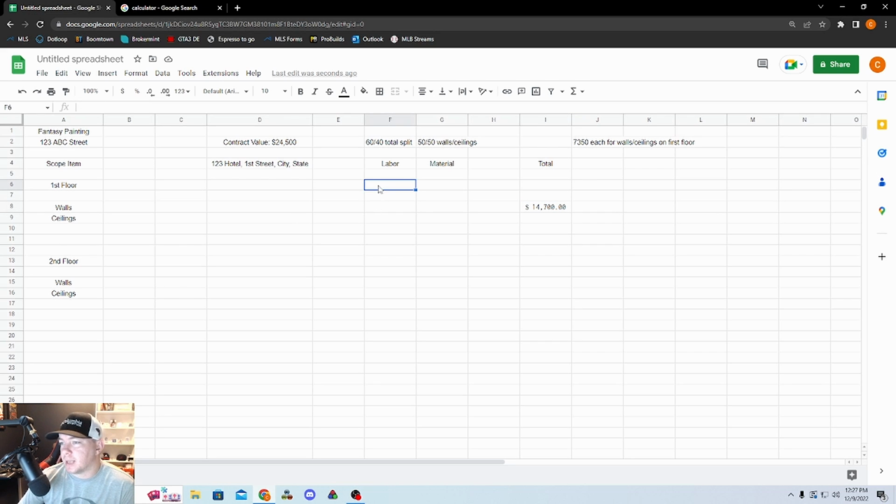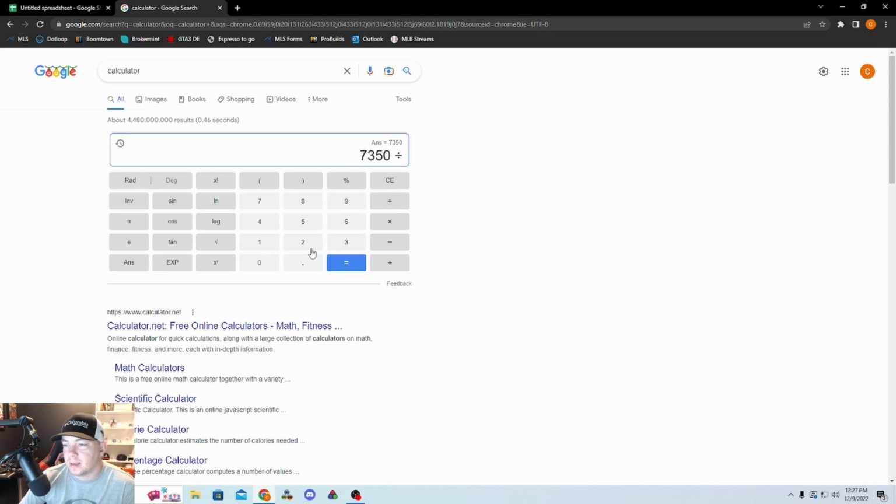It makes sense to me because I've done it many times before, but if it doesn't make sense to you, just ask a question in the comments below, and I'll get back to you. So 14,700, 73.50 each. If you multiply 73.50 times 2, that'll give you 147, so that checks out. So 73.50, we're doing it 50-50 walls and ceilings, so we're going to take our 73.50 and divide it by 2.